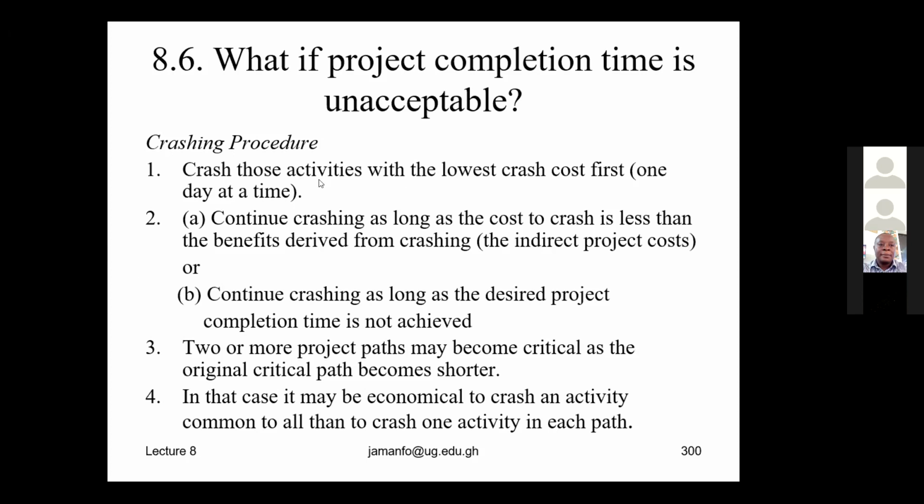So we crash those activities with the lowest crash cost first. Remember, we said we want to finish the work as early as possible, but we also want to do so at minimal cost. So we crash those activities with the lowest crash cost first, and we do 1 day at a time.